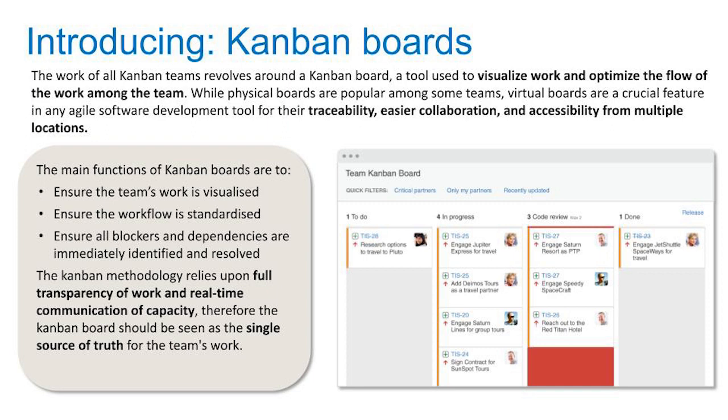This is where the team can break down, person A is doing this, person B is doing this, person C is doing this. And where leaders really like Kanban is they can constantly add to that list of things that they are doing. It's almost like a never-ending to-do list that can be reprioritized. So think of it taking that incremental and iterative approach and taking it to the next level. This is very popular within manufacturing. I believe it was Toyota that came up with Kanban in the 70s, something like that. Either way, it is used a ton in manufacturing processes because it works.